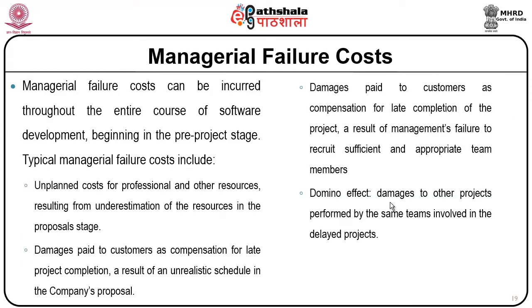Managerial failure costs. Managerial failure costs can be incurred throughout the entire course of software development, beginning in the pre-project stage. Typical managerial failure costs include unplanned costs for professional and other resources resulting from underestimation of the resources in the proposal stage.